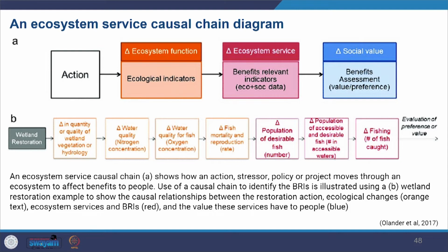During the scoping and baseline studies, it is also necessary to understand patterns of supply and use without the planned development, so that it is possible to predict how these can be expected to change as a result of development in the impact assessment. So you would be looking at both the scenario with the development and without the development, and how the future would look. Sometimes sufficient baseline understanding is available at the scoping stage, but often there are important gaps. So then you need to come back to that stage.